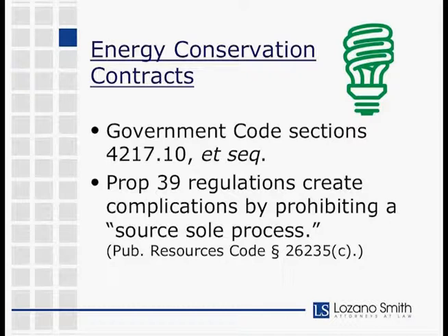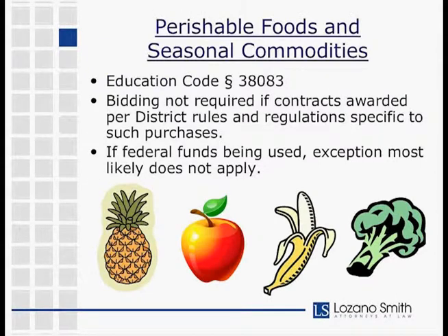And in fact, it could even alter the normal bidding process for architects and design professionals, since that's where you see that type of language. So, until there's guidance on this, the best advice is that districts can decrease their risk slightly by increasing the competitive process used whenever Prop 39 funding is being awarded. Another possibility would be to fund design professionals with non-Prop 39 funds, if that's even possible in the district's circumstances.